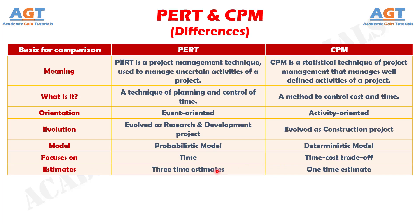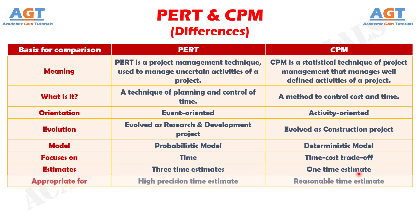Number 7: There are 3 time estimates in PERT — optimistic time, most likely time, and pessimistic time. On the other hand, there is only one time estimate in CPM. Number 8: PERT technique is best suited for a high precision time estimate, whereas CPM is appropriate for a reasonable time estimate.